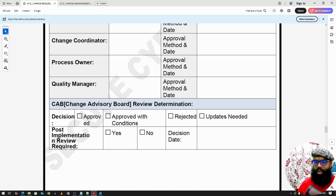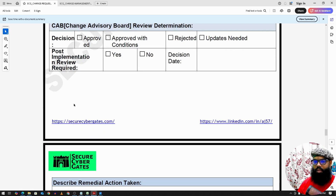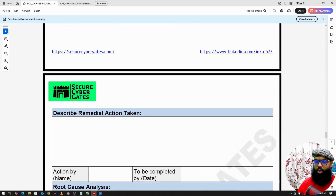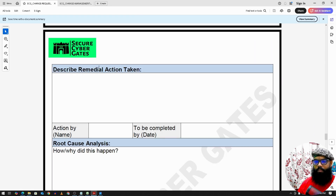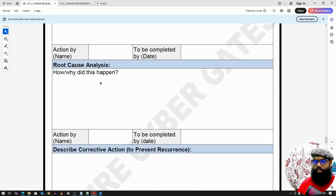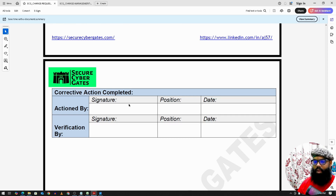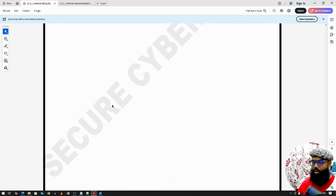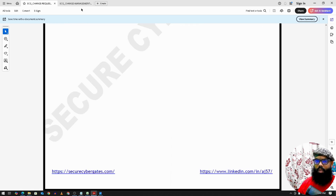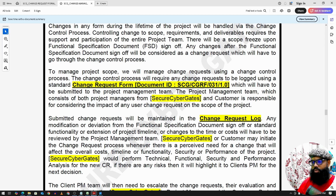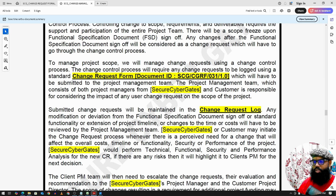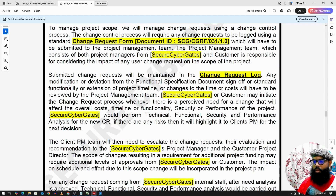We have a Change Advisory Board (CAB) that reviews the change request and either approves it or requests more input from the team. The form also captures the root cause analysis of why the change is happening. At the end, all parties sign and submit, indicating whether the change is accepted, needs more time, or is rejected. Once submitted, the change is logged in a central change request log tracker.